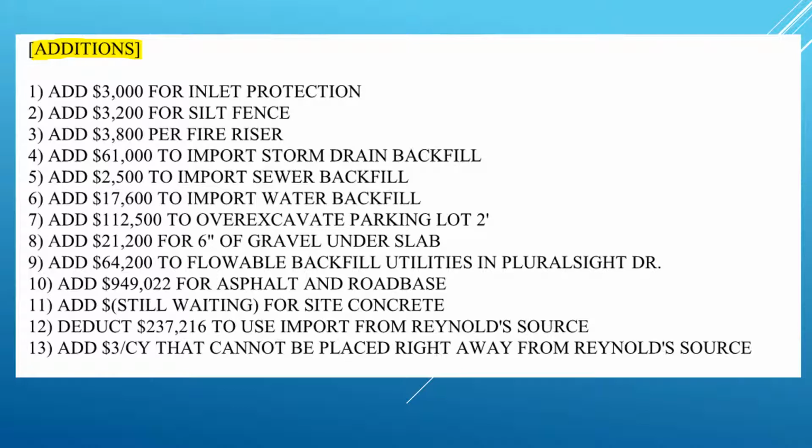Sometimes there's things on the geotechnical report that may or may not be included, so we give them the option. So very often, when we get a contract, the contractor will take certain portions of these additions and add them to our contract because they decide to take that particular option. And so we always have quite a few of these on the bottom of every bid.